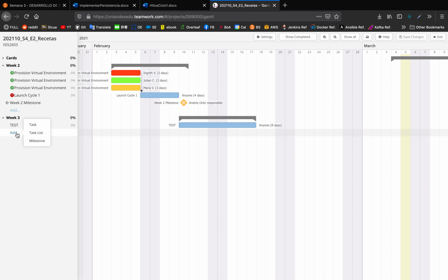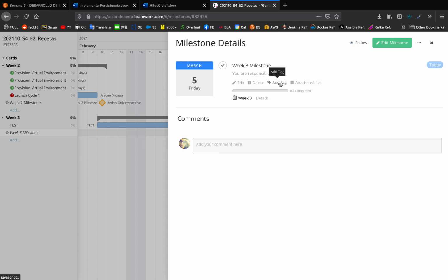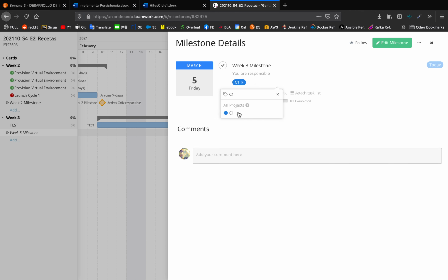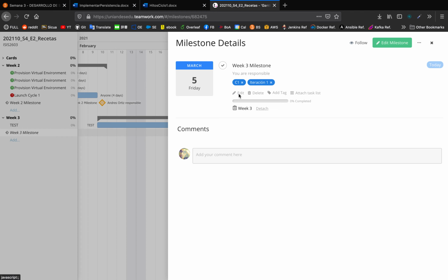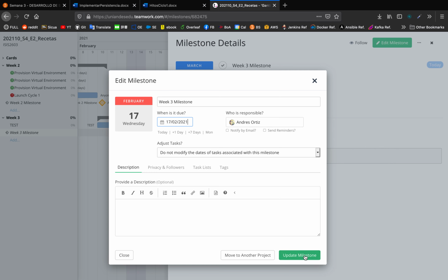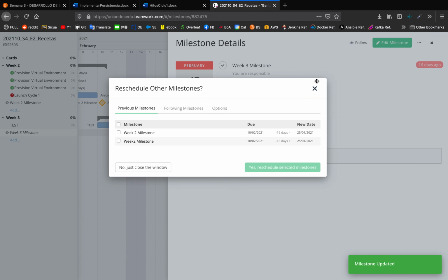Alright, so here we're going to create the week 3 milestone. Alright, so week 3 milestone. And once that's created, I'm going to go ahead and edit. And I'm going to add the tag. So once again, this is going to be C1. And it's also going to have iteration 1. Now we're going to edit this milestone such that it's going to be due on February 17th, which is, once again, the next deadline. We'll hit update milestone.